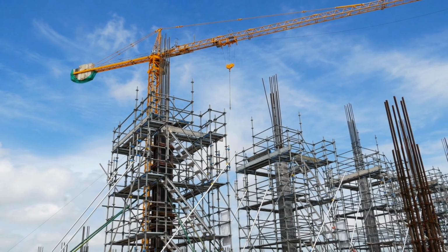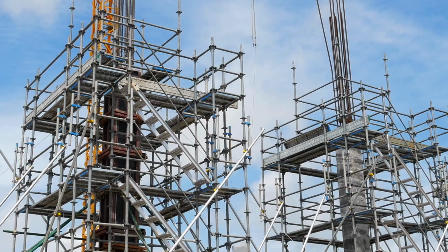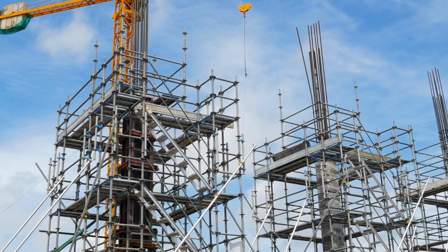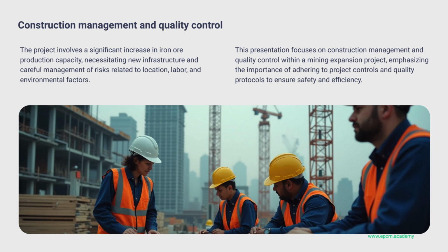Think about it. Mining is a high-risk industry. You've got geotechnical risks like unstable ground conditions, environmental risks like spills or dust emissions, safety risks associated with operating heavy equipment, and even risks related to community relations, especially if the project impacts local communities. It's a pretty daunting list of potential hazards.